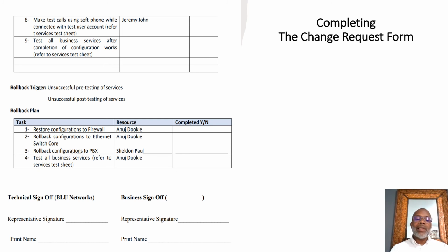Generally, technical signs off first before it goes to the business, because the business should understand that the technical team has signed off on functionality. Many times not the person that actually is going to run the actual operation, but another engineer to verify what is happening. They will sign off technically, or myself, and then it goes to the business or the relevant customer having confidence that we've signed this off and it's going to work. That is a summary of the change management process here, guys.